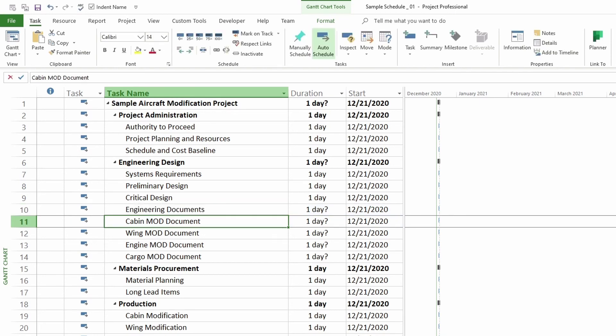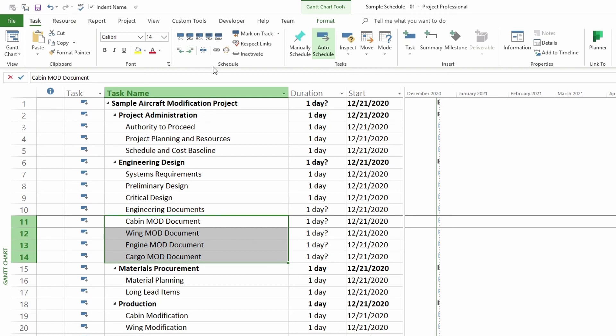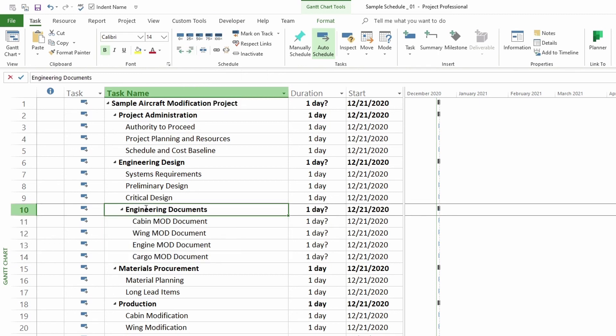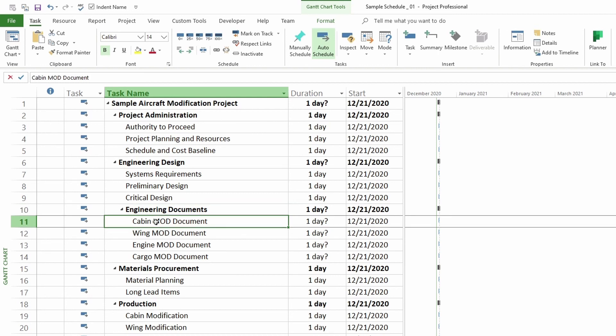And then you can highlight all your tasks that you want to go under it. Go to task, and then go to schedule. And then here there's an indent task, so this task becomes a subtask. If we click on that, now we have this new task that we entered as a summary task, and then all the tasks below it are subtasks. So there you go.